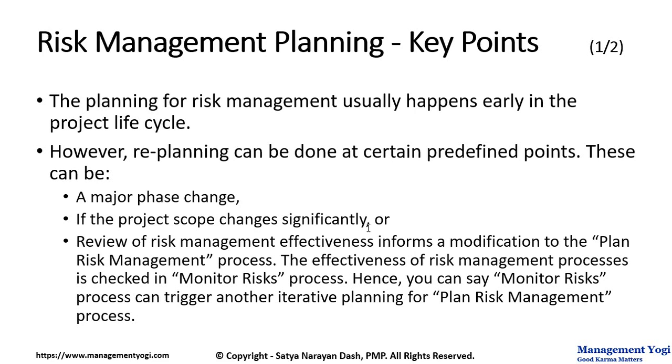Risk management planning, the key points. The planning for risk management usually happens early in the life cycle of the project. So a project will have a life cycle. This also we have seen before. In the early part of the life cycle of a project, you will do risk management planning.